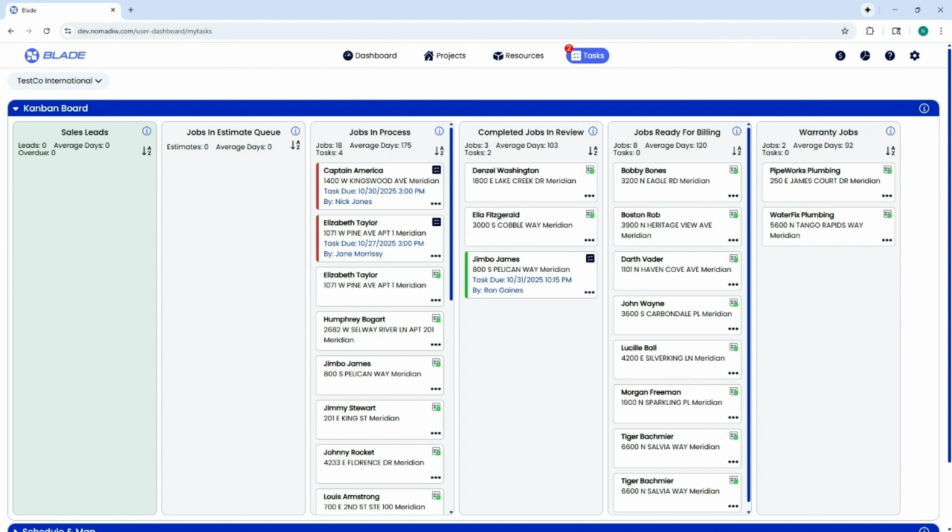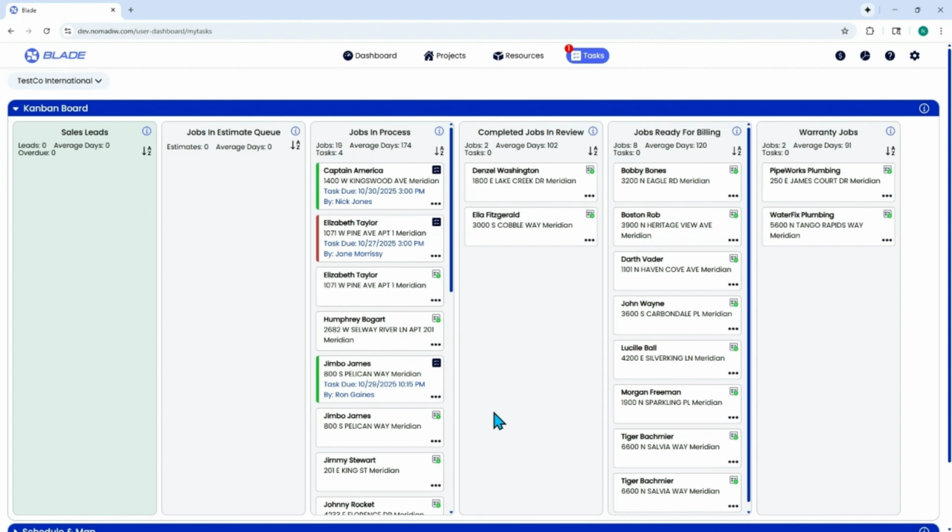Use these job tasks in whatever way works best for your company. For example, you can create a new task each day for this job. Or you can simply modify a single task by reassigning ownership to a new crew or individual each day with a new due date and additional instructions added to the task node.